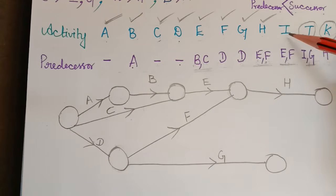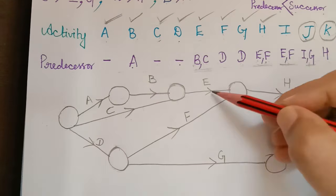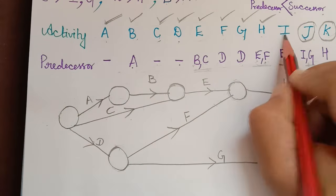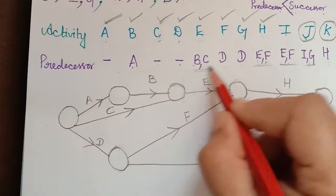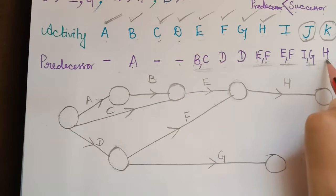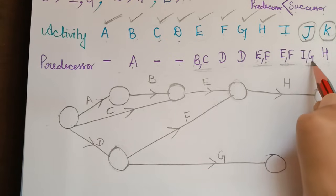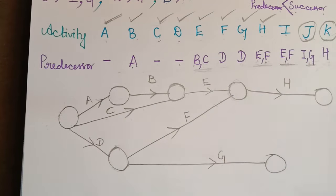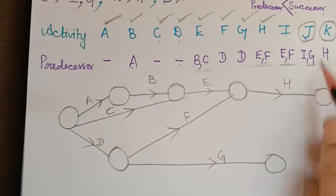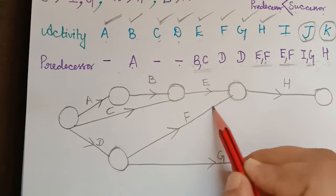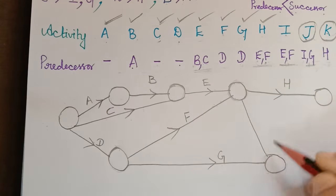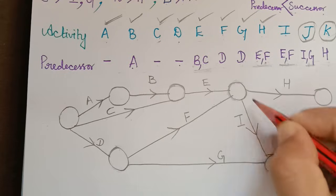Next is activity I. Its predecessors are E and F, so the starting point is the same shared end node as H. Checking the list, I appears along with activity G, which has already been constructed. So the end node of I must be the same as the end node of G. We draw activity I accordingly.